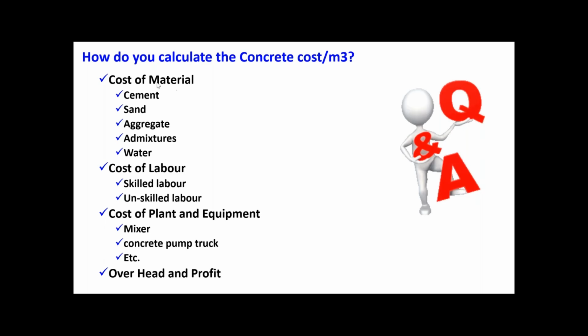Once you have done the all-in rate, you are going to add the overhead and profit on top. There are the net unit rate and the gross unit rate. Both are possible. The net unit rate is without profit and overhead, and the gross unit rate is with the profit and overhead. Both ways you can do it, but it is better to follow your pricing methodology.